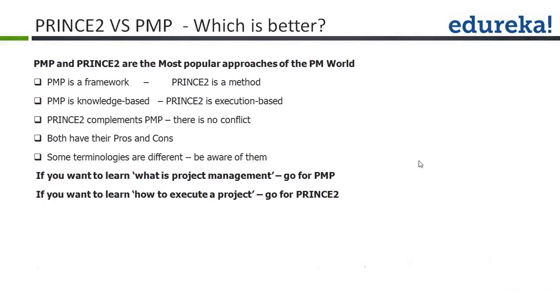Now, what are 6 aspects? Now, 6 aspects are like variables or performance targets against which you measure the progress of the project. For example, you can set targets in terms of cost, time, scope, and as you move forward in the project, you see the actual performance vis-a-vis the planned targets.